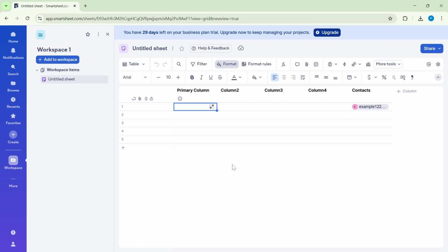Now, turn on Smartsheet's native efficiency features. Enable dependencies in project settings so your Gantt timelines and durations update automatically when dates shift. Use cell linking to pull single values from one sheet to another, and cross-sheet formulas to calculate metrics across projects. Automate workflows to send update requests or reminders to owners when due dates approach or statuses change.